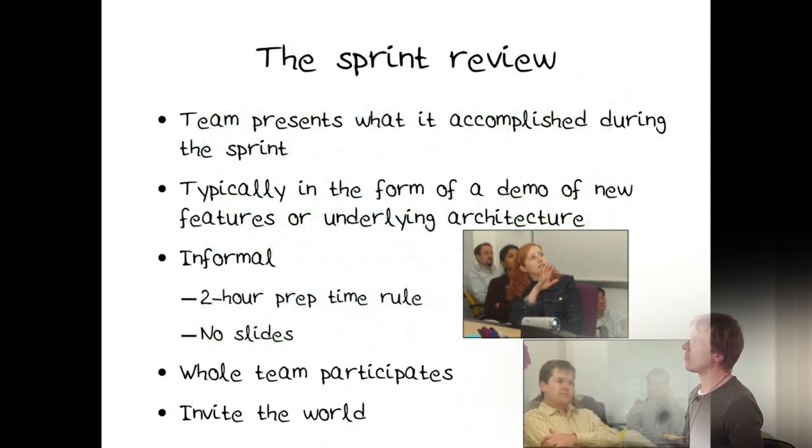The sprint review. Here, the team presents at the end of the sprint what they've accomplished, typically a demo. You don't have 2 hour prep time, you might have 10 minutes prep time, no slides. This is functionality you're showing, because the user stories are features, and either that feature is done or is not done. It's not the design of the feature. At times, you might want to show a database schema as a deliverable, but 99% of the time, what's being shown is functioning software. The whole team participates in this, and you can invite the world. Anybody can come to this meeting.